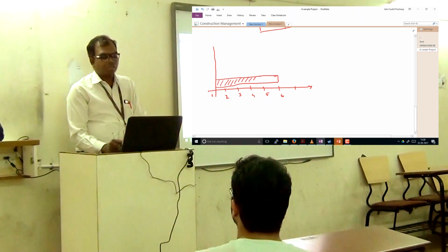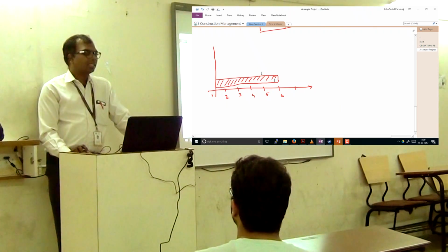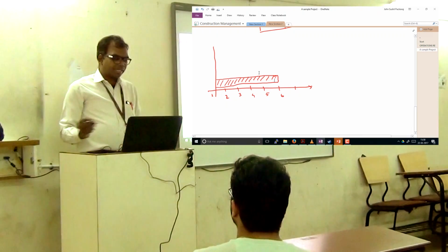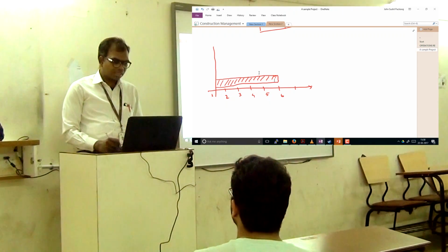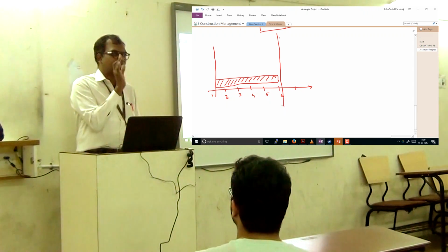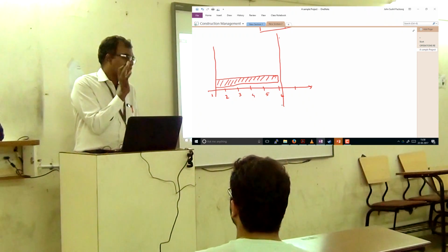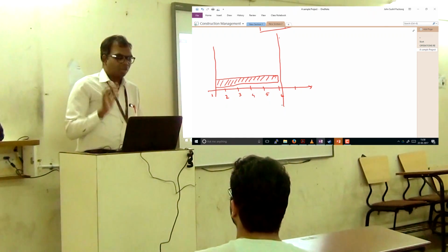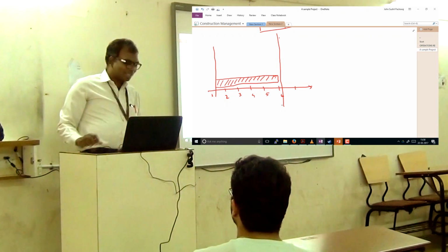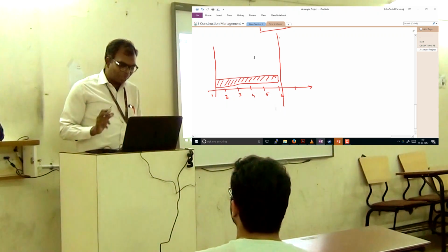After this, I got another activity called design. Design takes only 3 days. But the next activity cannot start till both these activities are completed. So this 6th day marks the finish of both the activities. Guys, probably I should have started with 0. I'm just leaving it like this for now.